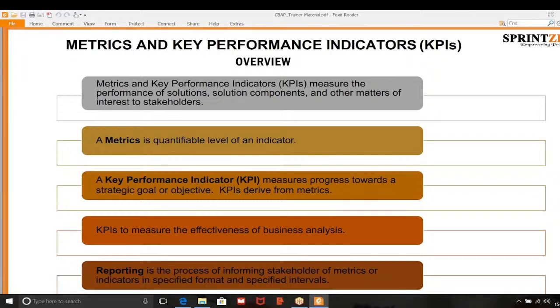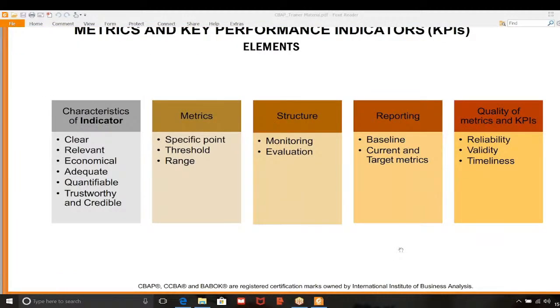But what happens is next month this team is able to achieve 205. So we will calculate how much percentage that is, so that we can know how close we are moving to our assigned KPIs. That's why, if you see the fourth item, it is KPIs to measure, then there should be an evaluation criteria, how you're going to evaluate that. That's an important part, evaluation of your indicators.